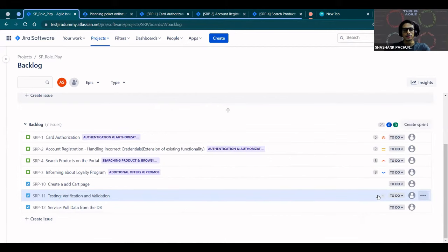Like usual, Shavik, it is 6 hours per day that we're taking into capacity, right? So you are saying you will just take 6 hours to complete this task, Sashank? No, I'm saying how are we calculating the number of hours? I just wanted to know how many hours you will need to complete this task, and that's again just an indicative date. It should not have to be exact. Yeah, I think based on my experience, 18 hours.